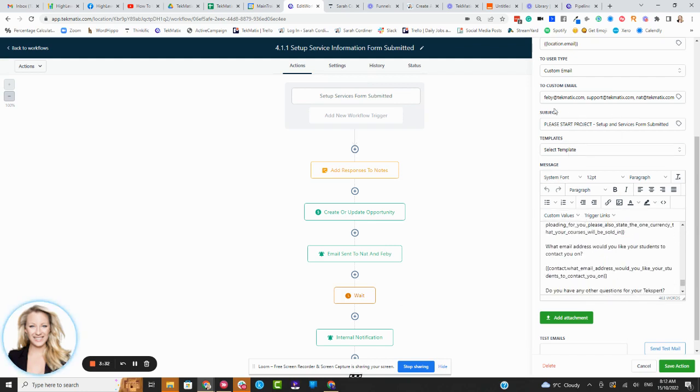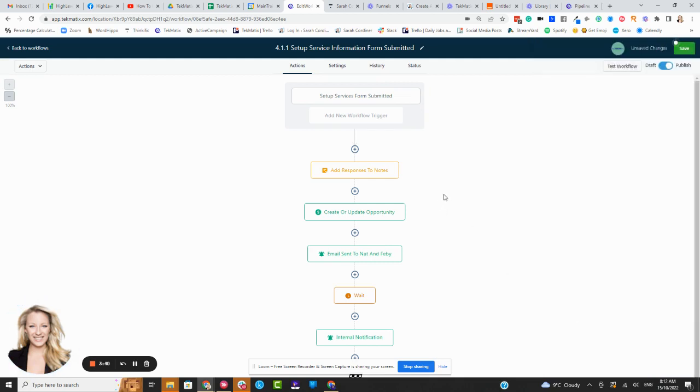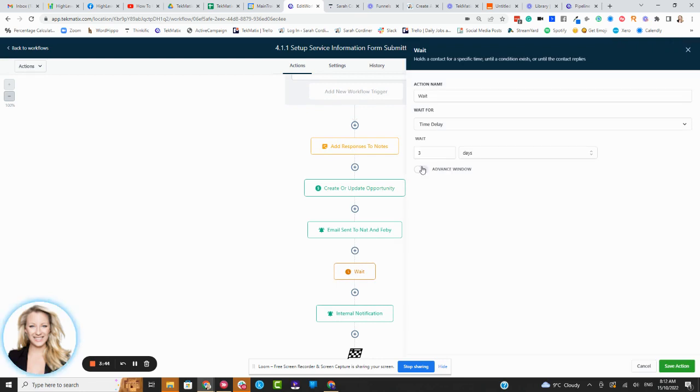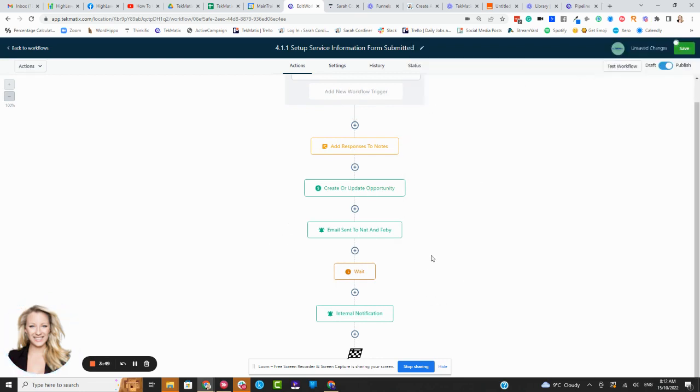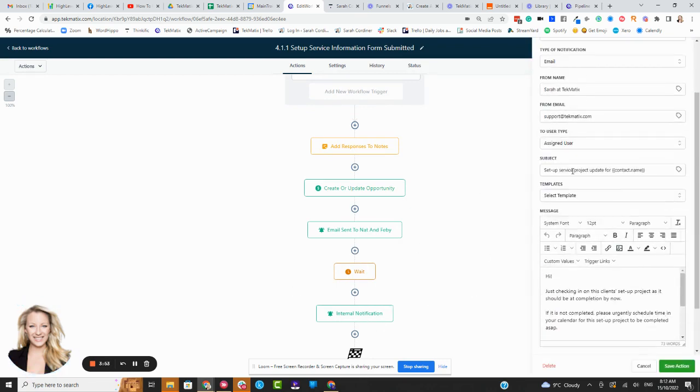So you might actually be sending this to yourself if you are the person in the business that's doing the project. You're going to send this email to yourself so that you are getting all of the information, keeping yourself nice and organized. Then what we're going to do is wait for 3 days. So I'm basically going to give the team 3 days to complete the project maximum. And then after 3 days, we send an email to the team.